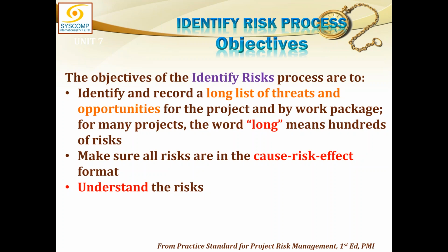Number two, do not only collect the negative risks, threats, but also pay special attention towards the recognition and identification of positive risks. These are the opportunities. And try to do them from every possible angle. Maybe you can start with a work package. For each work package, you try to find what are the risks to this work package. Maybe you start with a risk breakdown structure. From every possible aspect, you must explore if there is a risk, and that can be recorded. It must be jotted down into the long list.